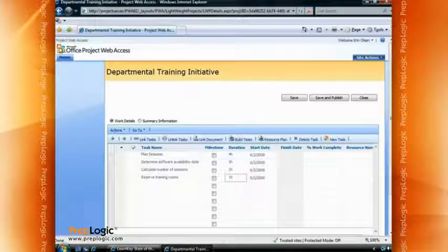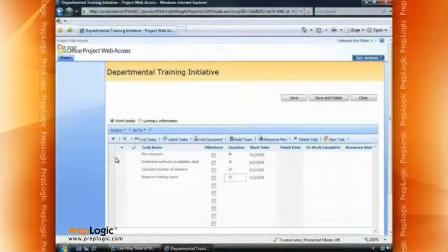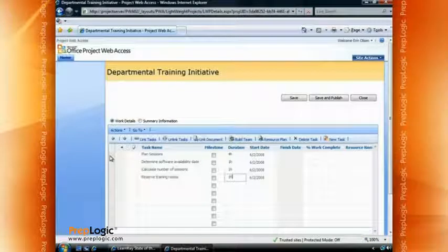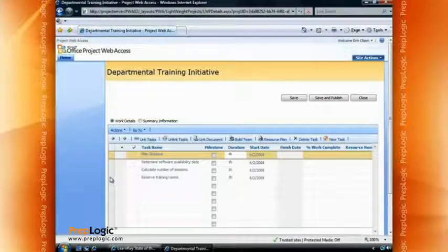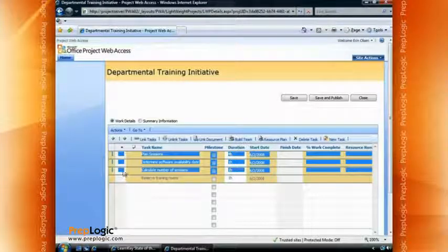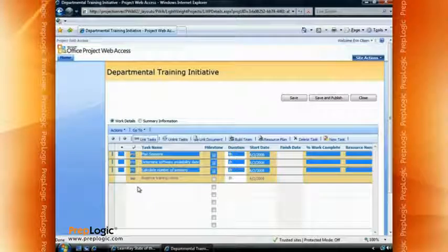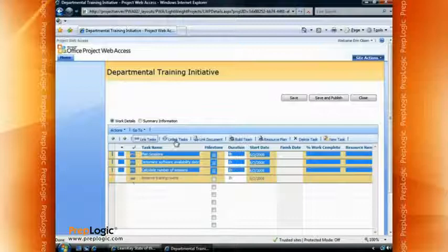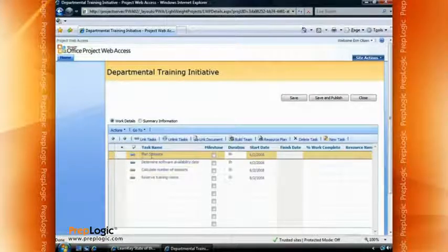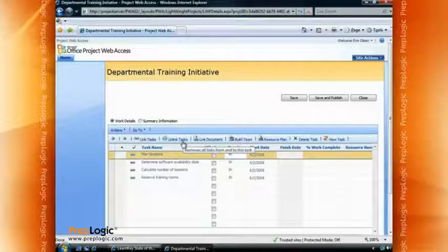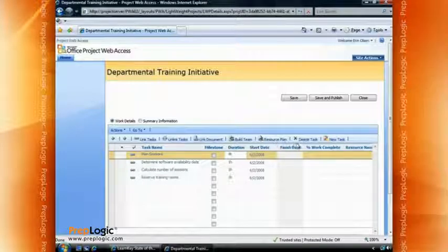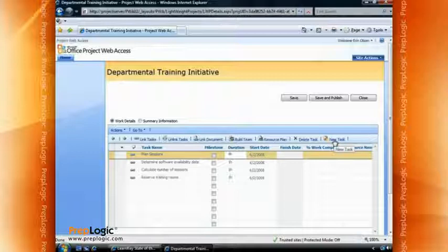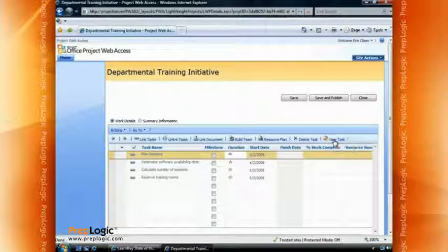Like the rest of Project, we need to be able to link these tasks and we can also outline the list. To link tasks, you need to select them — move over to the left-hand column, click, and use techniques like click-shift-click to select them, then click the Link Tasks button. What's different here is that you only see the link icon in the Links column; you don't see a line like you would in regular Project. If you choose to unlink tasks, even selecting a single task will unlink all tasks — you can't do them one at a time. You can also delete a task or add a new task on the far right, but unlike the full client, you have to add new tasks one at a time; you can't highlight five rows and insert five new tasks.